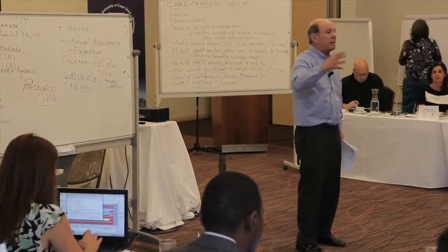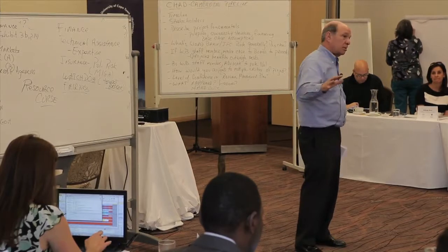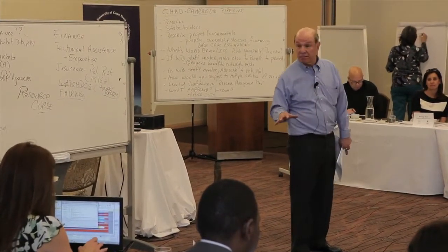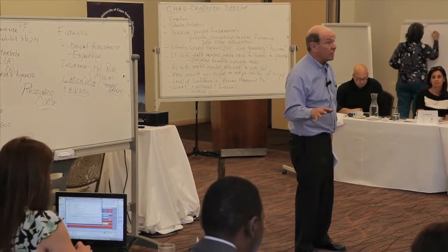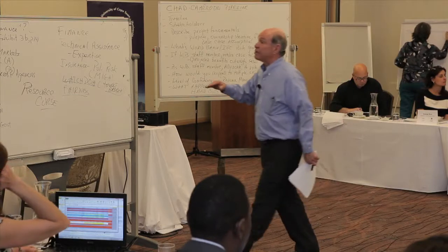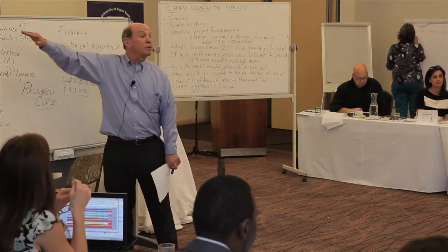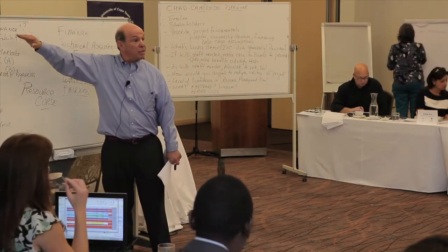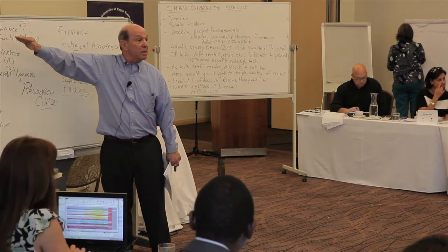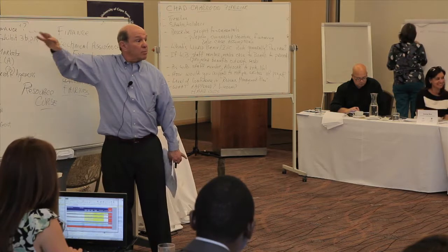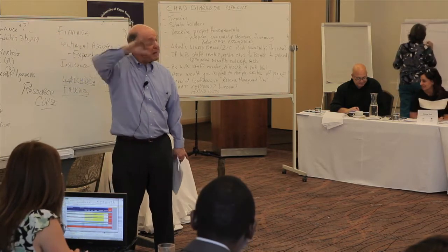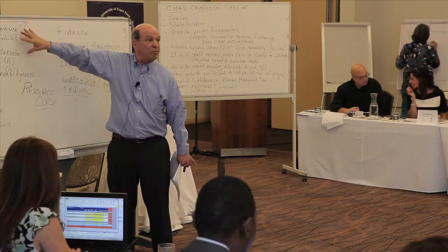And all that data was based on the original base case, which I talked about at the very, very beginning. Does anybody remember? We said that with all project finance, it all comes back to revenue generation. Everything depends on revenue generation. And that base case projects a certain amount of revenue over a certain period of time. And forget about allocation of where those revenues and profits go.